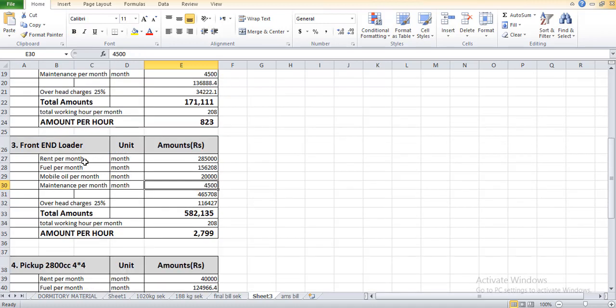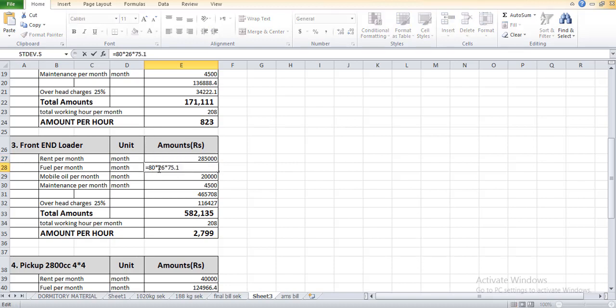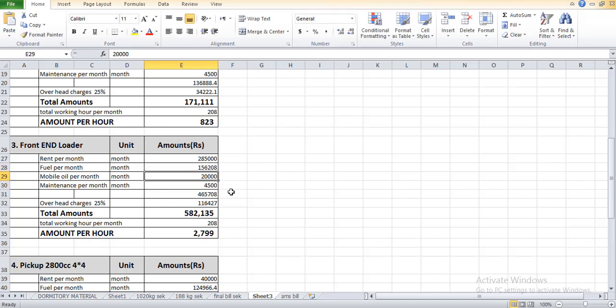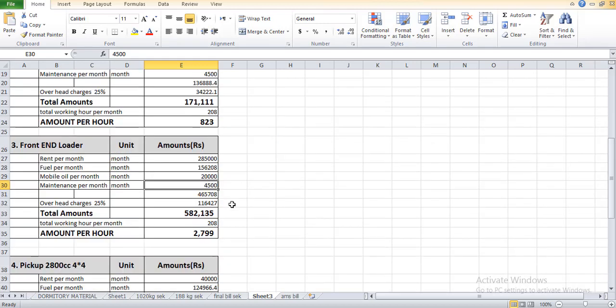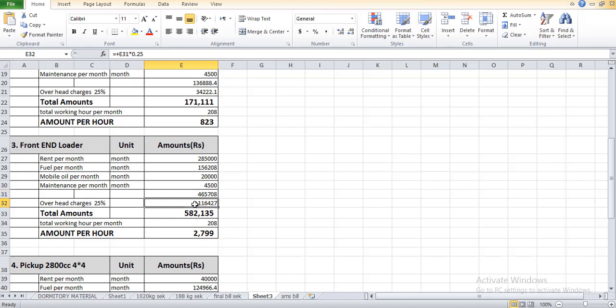For front-end loader, rent is 285,000 because this is the loader which we use for pushing, dumping of soil and distributing it into layers. The fuel per month required for 8 hours is 80 liters, meaning for one hour is required 10 liters. 26 is the number of days and 75 is the cost which becomes 156,208 rupees. Mobile oil is 20,000 and the maintenance per month is 4,500. The overhead charges is 25 percent which is 116,427 rupees. The total amount if you divide by 208 will become 2,799 PKR.